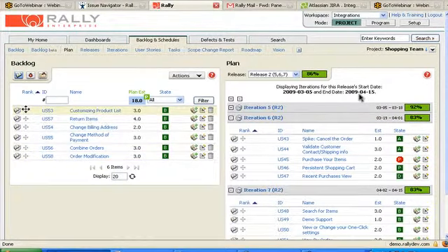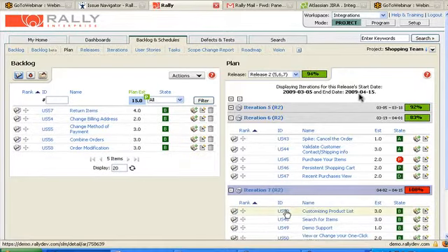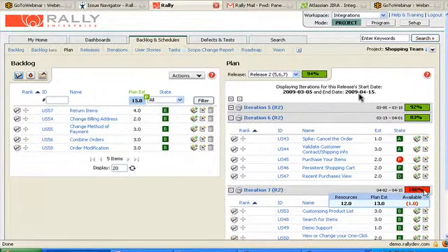So here you can very easily drag and drop stories from your backlog into one of the iterations, and you'll see that I dropped a little too much work in there, so now we're 108% full. But with the backlog page that I just showed, as well as the ability to very easily plan, you can quite easily keep track of many Agile teams across many iterations and releases.